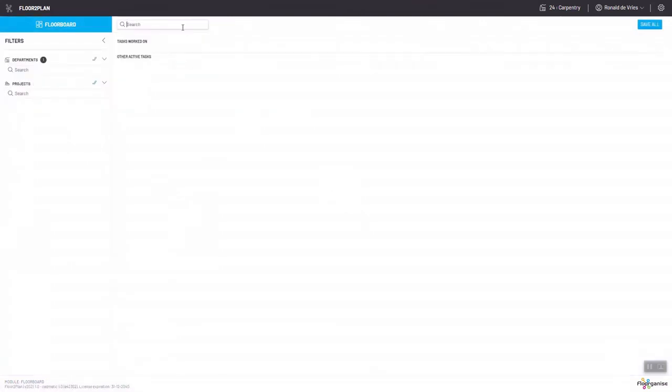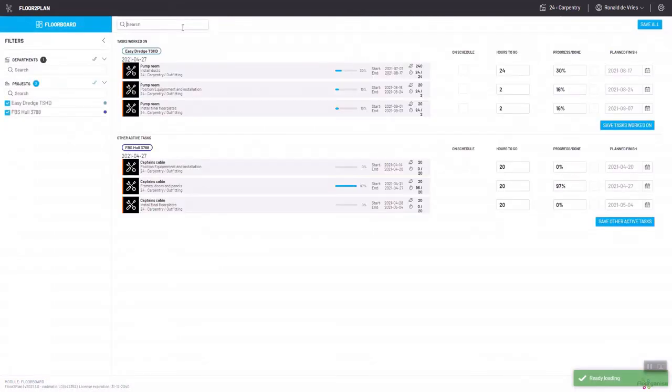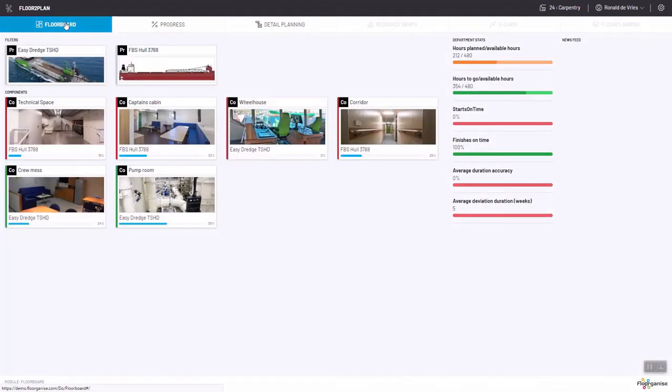Now I have here a progress screen that allows me, as a supervisor or a co-maker, if you would provide them with this similar screen, to recognize how the performance of this department is running for these activities. So I can submit a weekly overview here on the level of progress and what the actual planned finish date is, and therewith the centralized project plan is updated, deviations are recognized, and mitigating actions can take place.